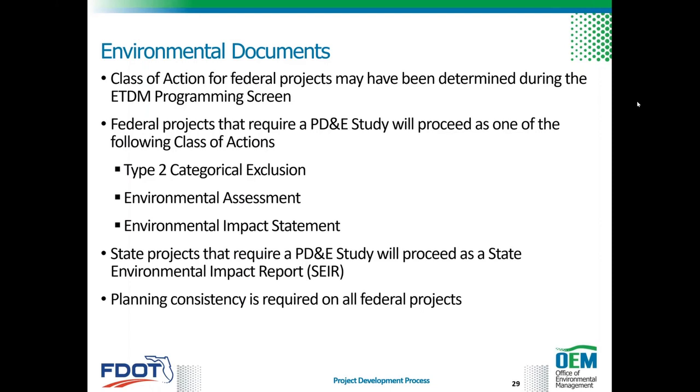Projects requiring a federal action or that use federal aid funds must meet planning consistency requirements outlined in 23 CFR Part 450 prior to submittal to OEM for LDCA or location and design concept acceptance.